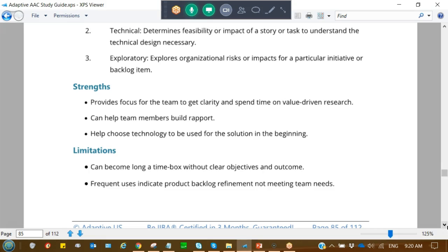And in the same way you could look at a spike that's designed to help refine the backlog, where it helps to integrate the analyst on the team, or the person with the heaviest analysis background, to do the thing that they do. The same thing is true from the testing perspective, where you might take a spike to say, okay, this is a particularly complex story. There are a lot of scenarios to deal with, so we as a team are going to need to take some specific time to develop the tests that we're going to need for this. Okay.